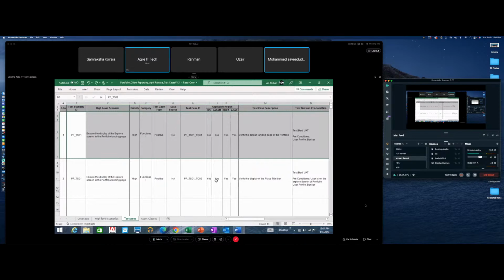And the Agile method, this is going to be a subtask of the user story. So one of the subtasks of the user story would be to write the use case, write the test case and execute the test case. Those are two subtasks of the user story, right? Those subtasks are assigned to the tester. Okay, got it.